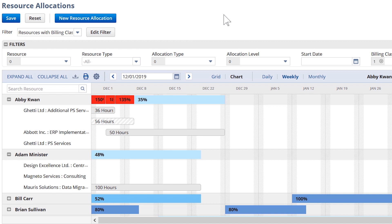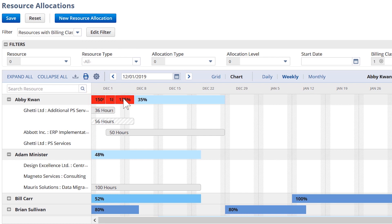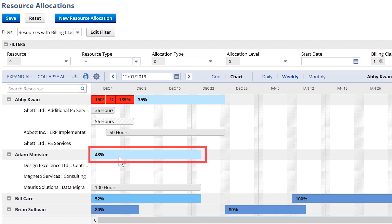The interactive chart allows me to identify where a resource may be overbooked, marked by red. Alternatively, I can easily identify which resources have free time and therefore are available to take on more work.